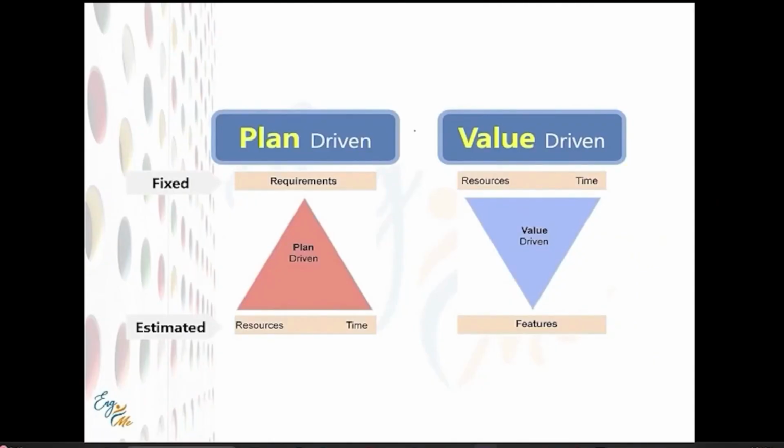In this slide, I brief what we said. Here is Agile, here is Waterfall. In Agile, the sprint is fixed in terms of time and resources. Time is 1 to 4 weeks. Resources might be 5 to 6 developers. In the sprint, there are no changes. But we welcome change, happy to change before or after the sprint time.